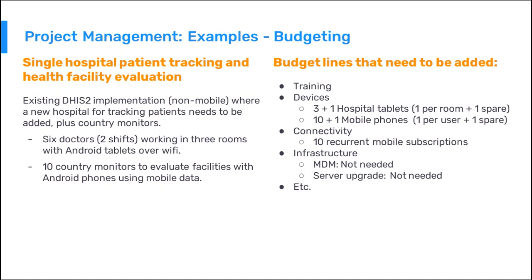For the budget of this implementation, it is necessary to consider training for use of the devices and the application, devices — because tablets and mobile phones need to be added — and mobile subscriptions for those users not using Wi-Fi. Since the amount of devices is small and the data to collect is limited, there is no need to upgrade the server or use an MDM.